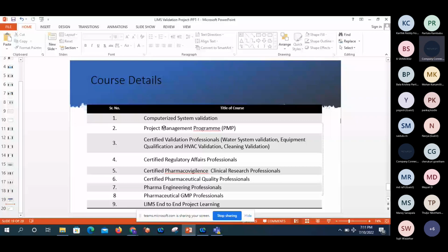Here I also want to add something before releasing the systems. Once you have completed your validations of any software, whether it's a LIMS or any other software, after release of the software there is a time period called the hypercare period. During the hypercare period, the vendor will take care of everything very carefully. After that, the vendor will hand over everything to the operation team or to the pharmaceutical industry.